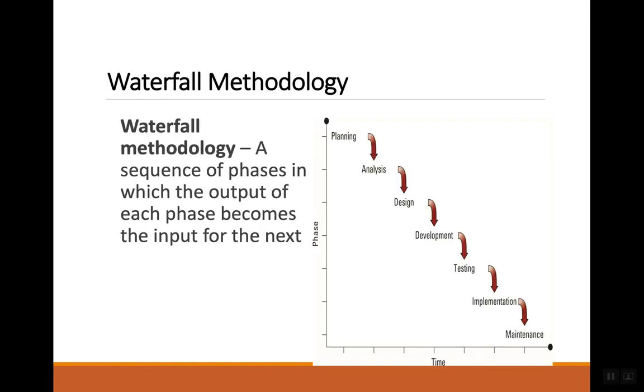First major technique is something called waterfall. A waterfall is a series of tasks which are executed in sequence, in which the output of one task becomes the input of the next. We look at planning as a project of a fixed length with certain deliverables, which are fed into the analysis phase, which runs a series of processes with its own deliverables, which are fed into design, development, and testing as we go through.